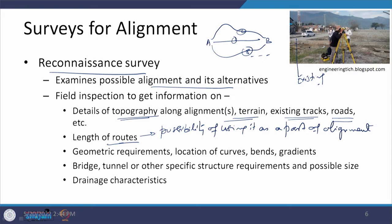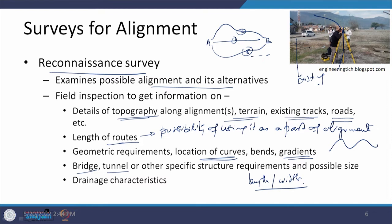What are the categories of roads available in that area, their route lengths, and the possibility of using them as part of the alignment? When the direction changes, we identify locations where the change occurs — these will be curve locations. If there are undulations, we see what type of gradients exist and whether we need to ease them. We also assess if specific features like bridges or tunnels are required, their length, width, number of lanes, and drainage characteristics — whether they are the same as depicted in maps or have changed.